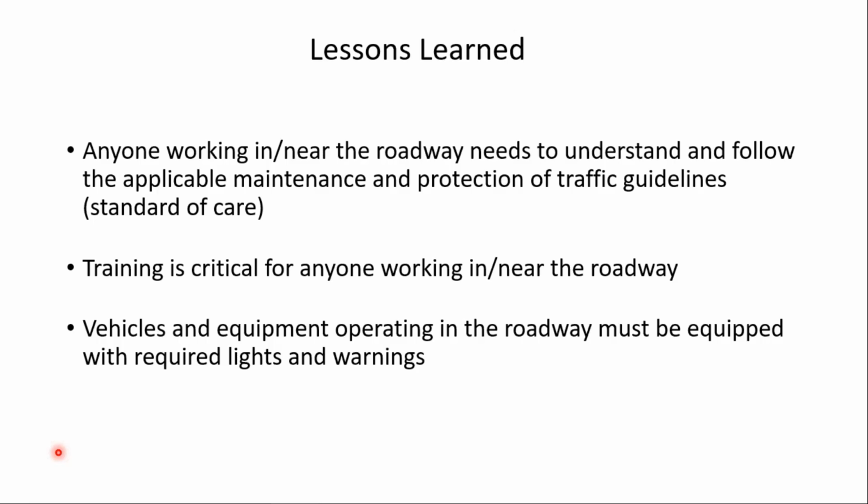And of course, as you all alluded to in your comments, vehicles and equipment operating in the roadway must be equipped with required lights and warnings. And in this case, and the plaintiff certainly would have highlighted this had the case gone to trial, there was a clear violation of state law. The photographs showed that this vehicle did not have, at worst, a slow-moving vehicle emblem mounted on it as well. So this was not a good situation.